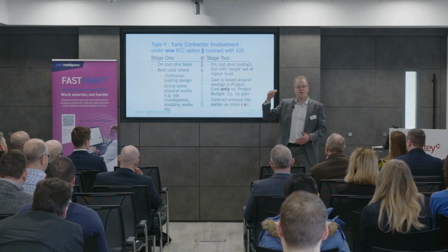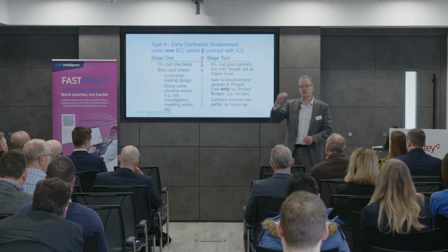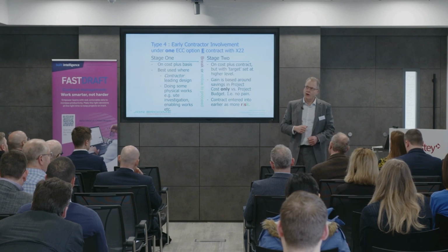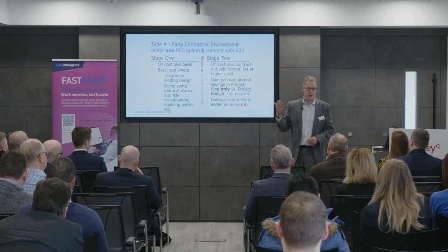That higher level includes frequently occurring risks which you want the contractor to include in their budget, the big B defined term. So things like compensation events.